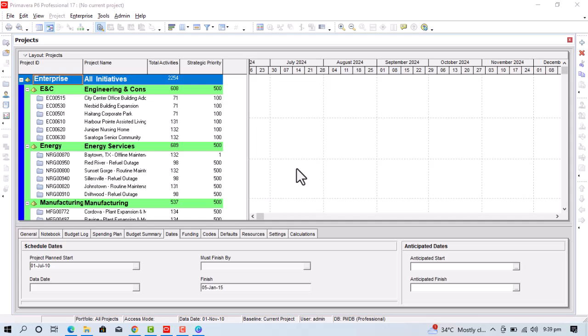if I say the construction of a house is a project, then in the construction of the house there will be many mini projects. For example, the layout of foundations, making of drawings, hiring a contractor or a consultant, etc. So there are a number of sub projects in a little project. When we divide a project into a number of little projects and then arrange them in a hierarchical view, it is called an EPS. Now let us see an example of an EPS.